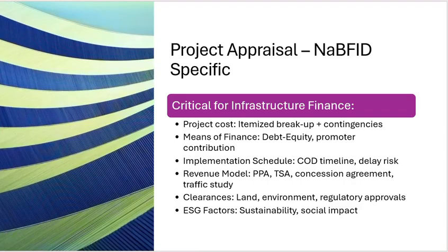We calculate the implementation schedule, what is the commercial operation date, the commencement of commercial operation, and the timelines, how feasible they are. In the technical feasibility, we check whether that date is achievable. We analyze delay risks, and if the risk happens, how much the delay would be.